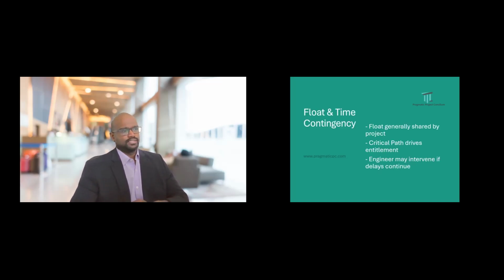Float and time contingency. Float is generally shared in the project, and who owns the float is a different kind of debate, so let's not go into that. The critical path always drives the entitlement. An engineer may intervene if the delays continue. These authorities have been given in FIDIC: if the delay is prolonging, the engineer has the right to take action against it.